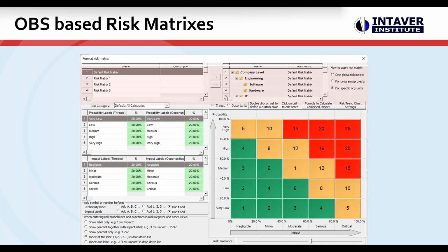One other thing in the qualitative that's shown in here that you might not have seen before is these scoring values. Normally, if you have a risk scoring, it's going to be impact times probability, 4 times 5 equals 20. Now, if you have a different scoring method that you would like, depending on where a risk lands, you can override that by entering in your own values. Let's say you have an impact that's higher; you could enter in 22.